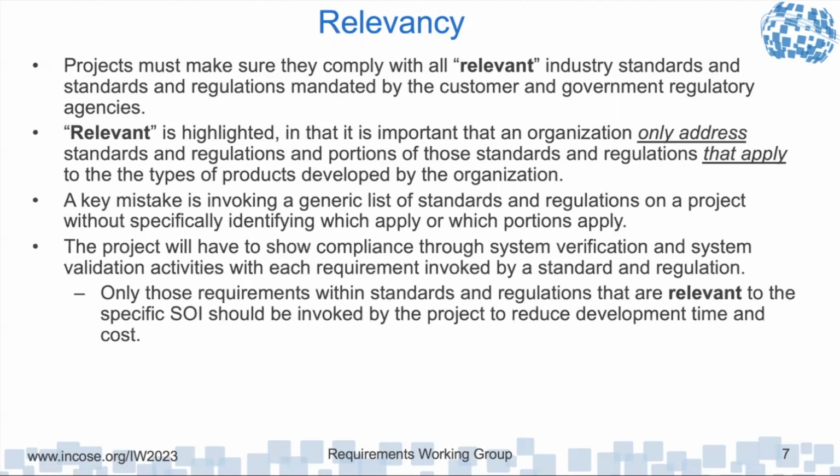The project's going to have to show compliance through system verification with each requirement invoked by standard and regulation. So you don't want to invoke things that are not relevant. You want to make sure you're invoking only those requirements within standards and regulations that are relevant to the specific system of interest that you're developing, to be included in your technical requirements.